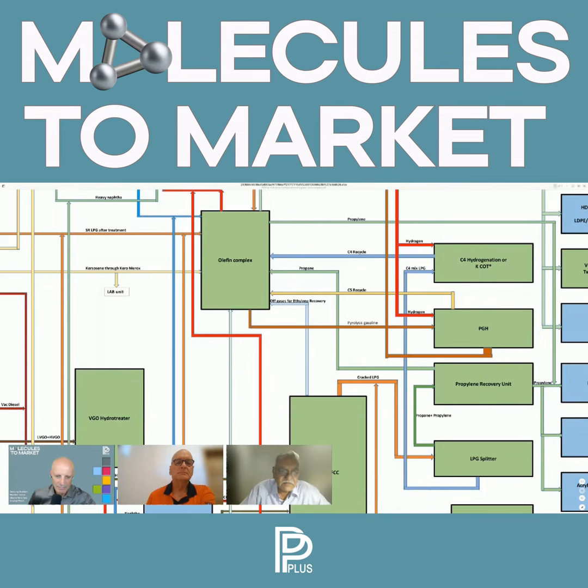And for the process, the technology part, since I already have the configuration, I have a fair idea of the unit capacities. Now, we have a very strong data bank that based on the unit capacities itself, we can work out the unit level costs. So I can work out the process costs. I can work out the utilities and offsites cost from the preliminary design, so to say, which is carried out at this stage. And we can work out all the infrastructure costs.